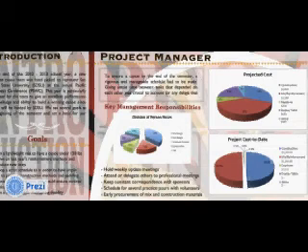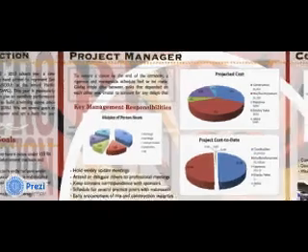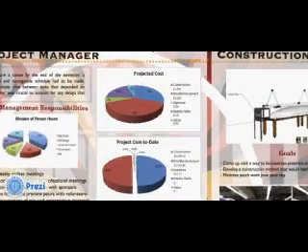The determination of the structural reinforcement was also behind schedule 17 days due to the delay with the hull design and also because there was a slower than anticipated learning curve. Fortunately, this task was scheduled to be completed several weeks before the pour day. The design of the concrete mix was finished ahead of schedule, which helped to have more casting practices by the team. There are several challenges we faced during the course, but we were able to overcome these challenges with proper planning, distribution of work, and overall good communication within the team. All our goals were reached.